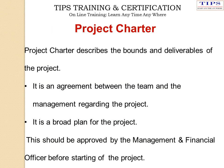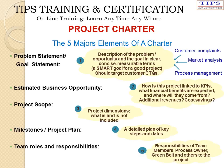The project charter is prepared based on the CTQs. The project charter describes the bounds and deliverables of the project. It is an agreement between the team and the management regarding the project, and is a broad plan for the project. The project charter needs to be approved by the management and financial officer before starting the project.